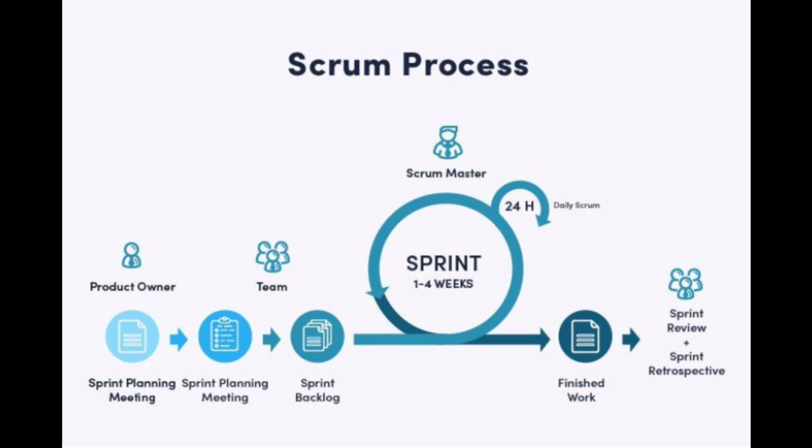So what is a sprint planning meeting? When are we going to conduct the sprint planning meeting? On the first day of a sprint we conduct this meeting, and we conclude how many user stories we are going to cover as part of this sprint. Basically, a sprint means a particular time frame or duration. Most organizations follow a 2 week sprint, that means 10 working days out of 14 days.